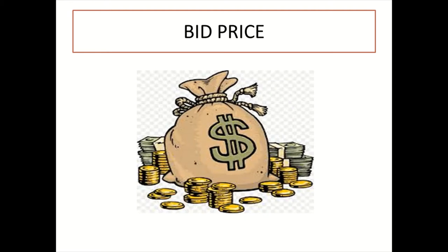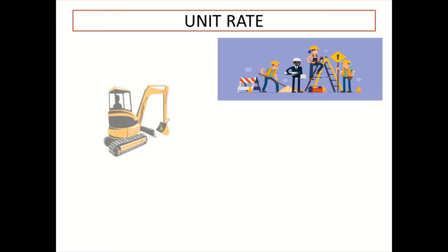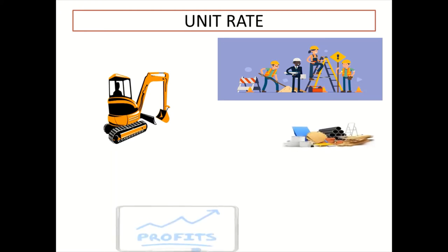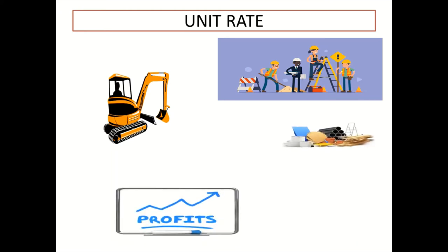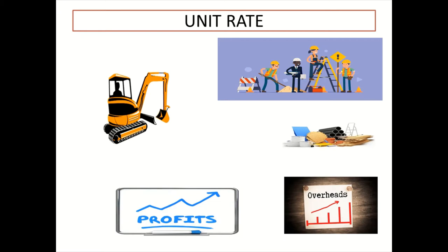In order to come up with the bid price, a contractor would have to work at the unit rate for each item in the bill. The various elements that contribute to the total cost of an item of work are labor, plant, materials, profits, and overheads. So I do hope that you enjoy the video, and if you have any questions, do leave your question in the comment section and I will get back to you as soon as I'm able to.